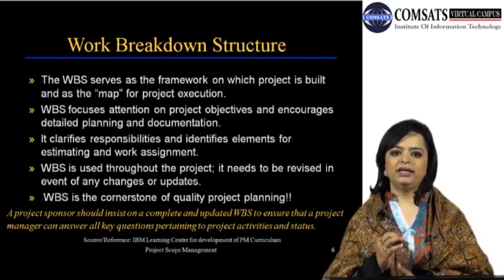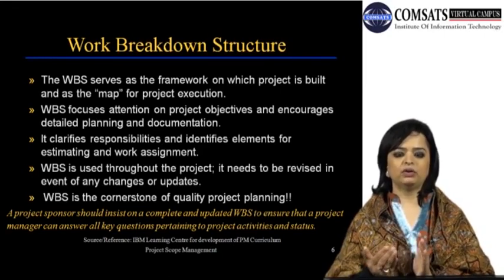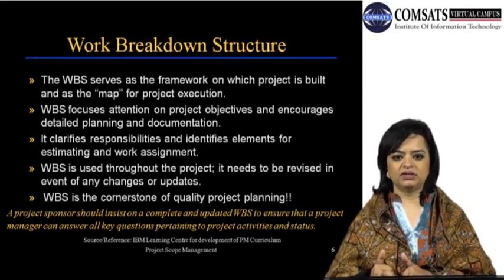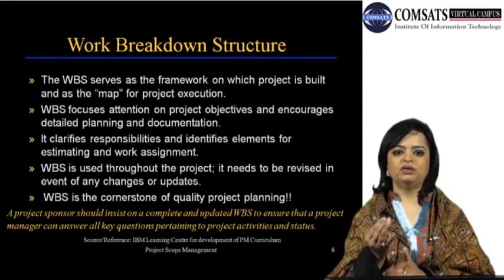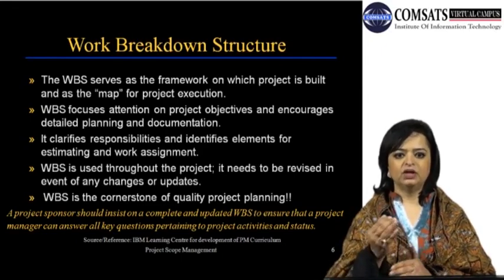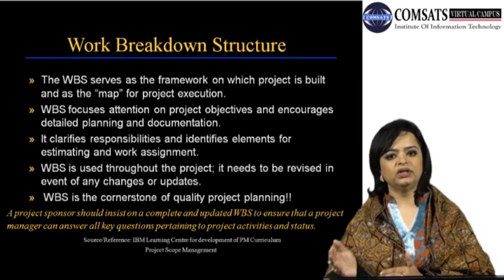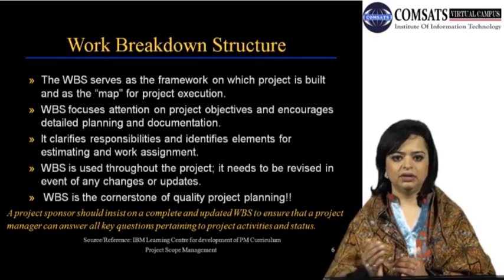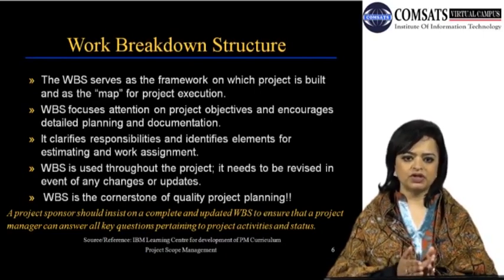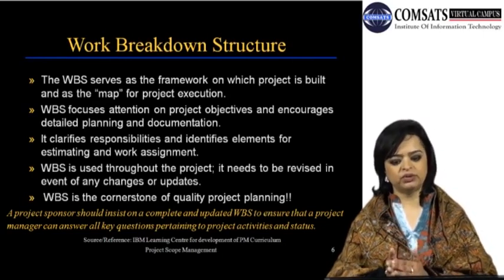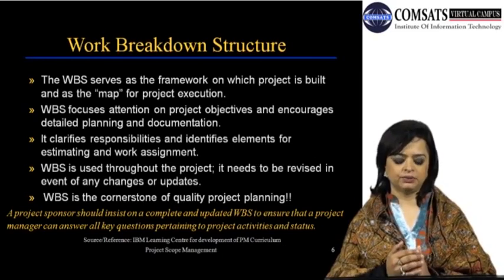So under providing a report, report A, the person who will be responsible for delivering report A will come up with subsequent levels underneath it, or sub-activities, that will help him or her to deliver report A. So that continuous movement of drilling down, ultimately to the level of effort or to the work package level, focuses the attention of responsible individuals on project objectives, and also obviously is encouraging planning and documentation.